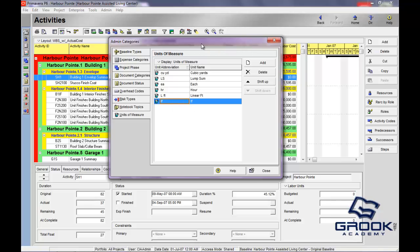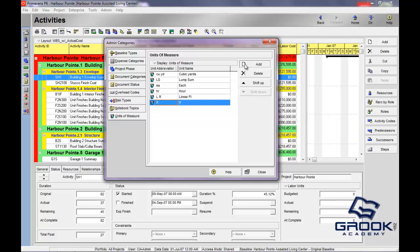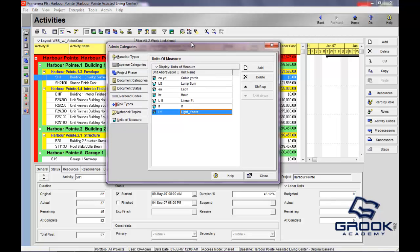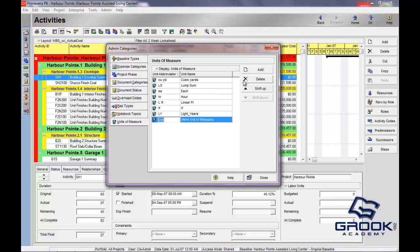And then we have units of measure. This will allow you to create custom units of measure. Let's say that we want one that's going to have to do with time. Let's say light years. So we'll put LY here. We'll put in light years. Now we'll have a brand new unit of measure. This goes with, this will go when you're progressing a schedule. If you're going to use the percent complete type, units, percent complete. If you have 100 gizmos to build and you've built 50 of the gizmos, then you can make a unit of measure here, which is gizmos.